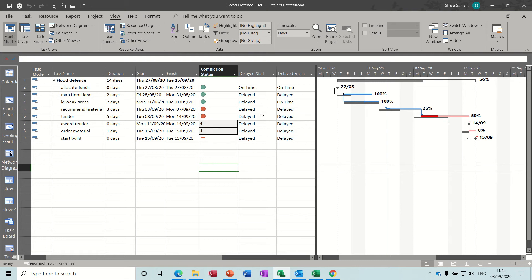For the delayed start column, the first task was on time but everything else was delayed. There's a formula in there which I'll show you how to do in a second. And for the delayed finish column, everything was delayed except the first one, because even though the start was delayed, time was picked up and it actually did finish on time. So there's a formula statement in there showing you how to do that.